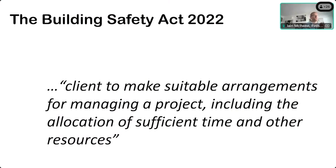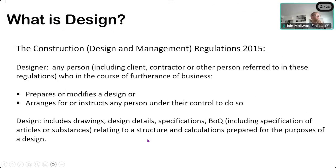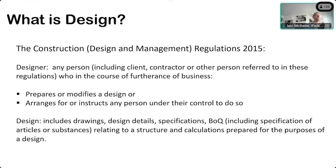If we start to ask where we haven't been given adequate resource, we need to look at what design actually is. The Building Safety Act is quite loose on its definition of design. The CDM Regulations 2015 define a designer as any person — including client, contractor, or other person — who prepares or modifies a design, or arranges or instructs any person under their control to do so. Critically, design includes drawings, design details, specifications and bills of quantities — all the elements that together form the design development process.